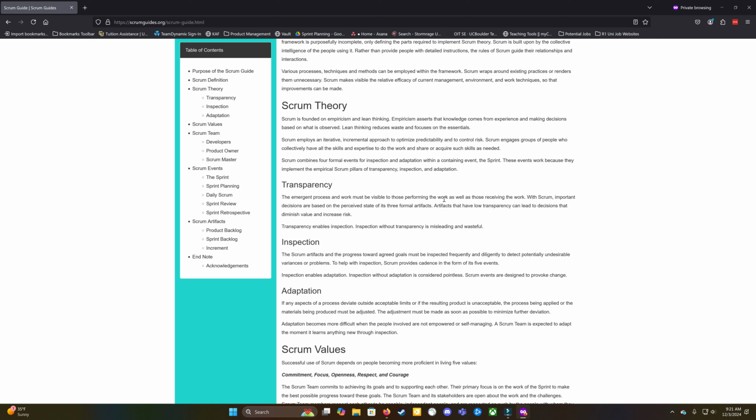No, we cannot work on that right now. This is why. This is our product backlog. These items, based off of our analysis, which was done this way, rise higher in priority than yours. Therefore, yours will have to wait. And yelling about it will not change that. Be transparent about that fact, about the fact that you have a process. You've made a judgment call as a product owner. You are empowered to make that judgment call, and you are not going to change it as a result of a change in the volume of the participants. And that transparency will buy you so much goodwill.